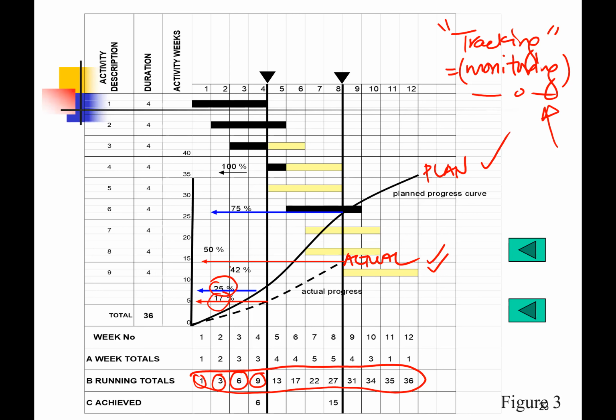Then if you do nothing, still thinking that it is okay, until your 8th week, which is almost at the end of the project, with 4 more weeks left, you notice that you are supposed to reach 75%, but you only managed to complete 42%, which now is around 33% delay already.